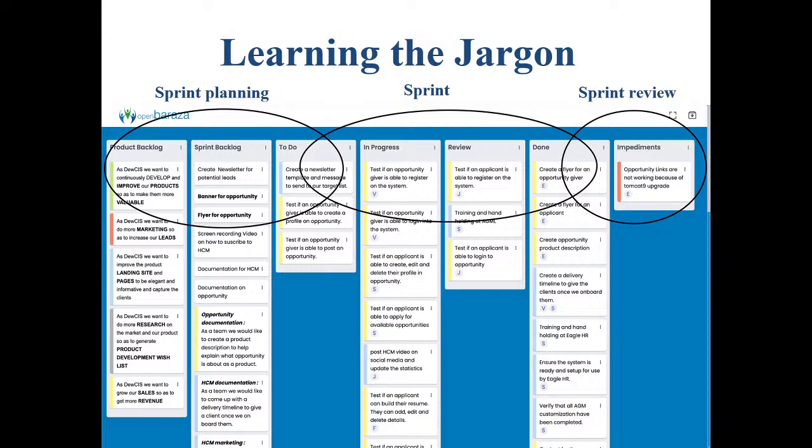Once you keep them there, you break those stories into smaller items that a single person can do, and that to-do would be a task that you can do in a day or two. A user story can be done within a sprint, let's say 2 weeks. A task should be done within a day and can be picked by a person.